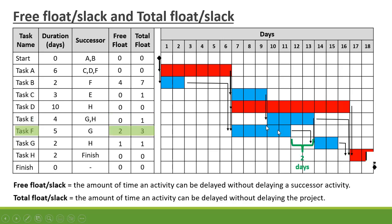Task F has a free float of 2 days. F is connected to G — as per the definition, free float is the amount of time an activity can be delayed without delaying a successor activity, so before F has an impact on G we have a delay of 2 days. G is connected to H with 1 day of float, so the total float is 1 plus 2 equals 3 days.